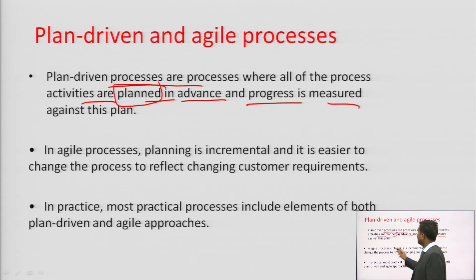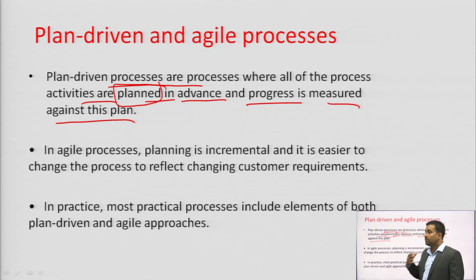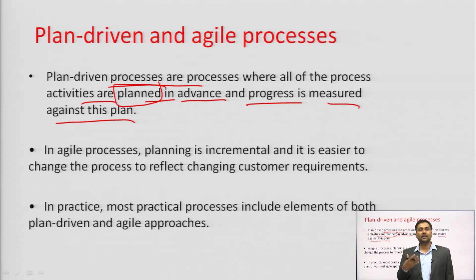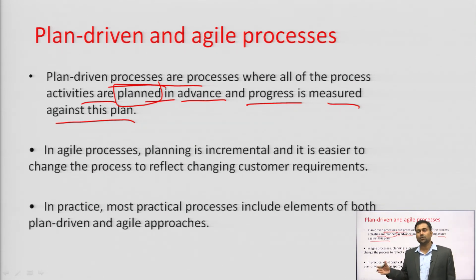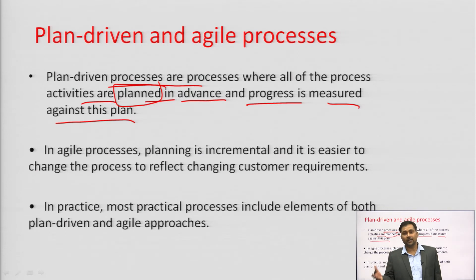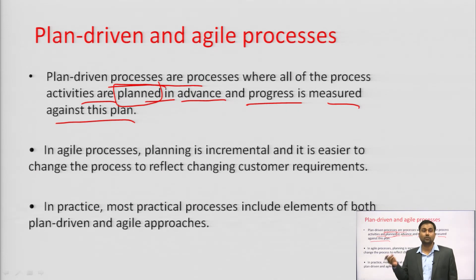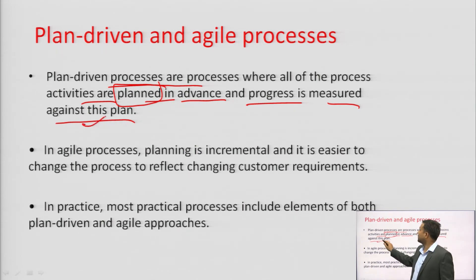Process progress is measured against the plan regularly. Based on measurement, quality improvement procedures are applied. If resources are lacking, training is arranged; if delivery may be delayed, resources are hired to speed up — ensuring we don't go over budget. All these things are measured time to time.